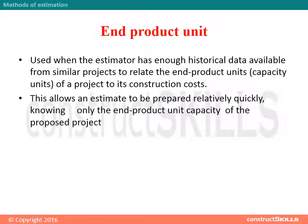End Product Unit: This conceptual estimating method is used when the estimator has enough historical data available from similar projects to relate the end product units of a project to its construction costs. This allows an estimate to be prepared relatively quickly, knowing only the end product unit capacity of the proposed project.